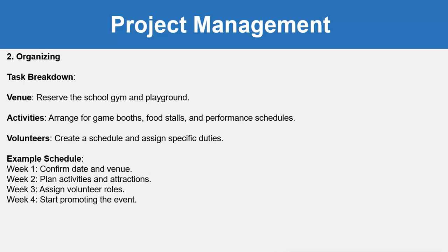For volunteers, create a schedule and assign specific duties. In the example schedule we will create, week 1 is to confirm the date and venue, week 2 to plan activities and attractions, week 3 to assign volunteer roles, and week 4 to start promoting the event. So it is a very basic and simple example of a schedule.